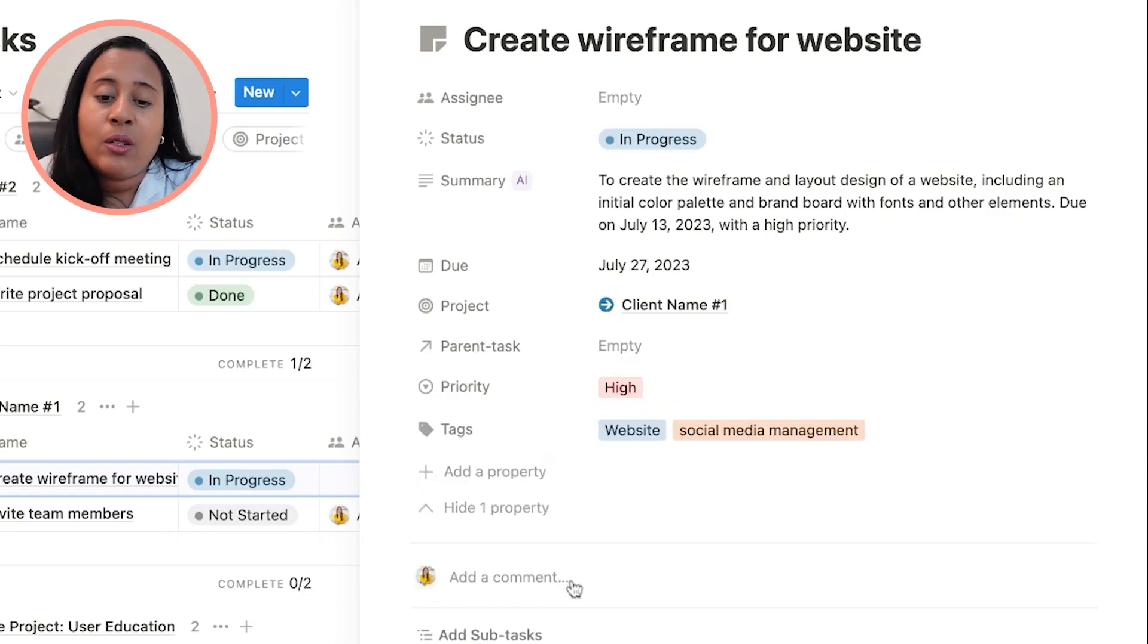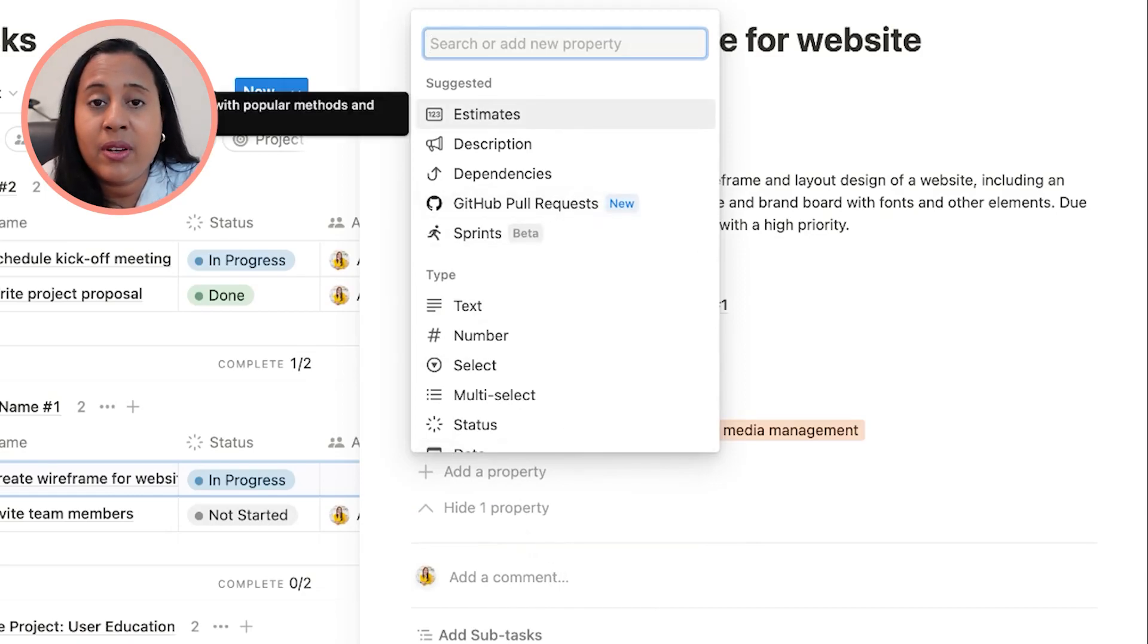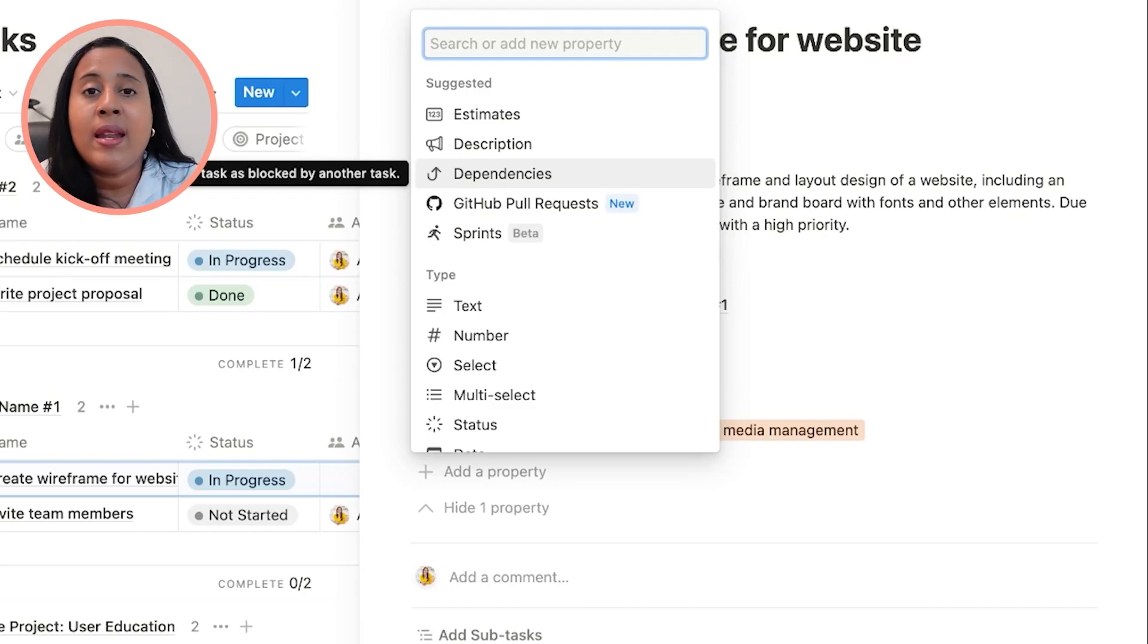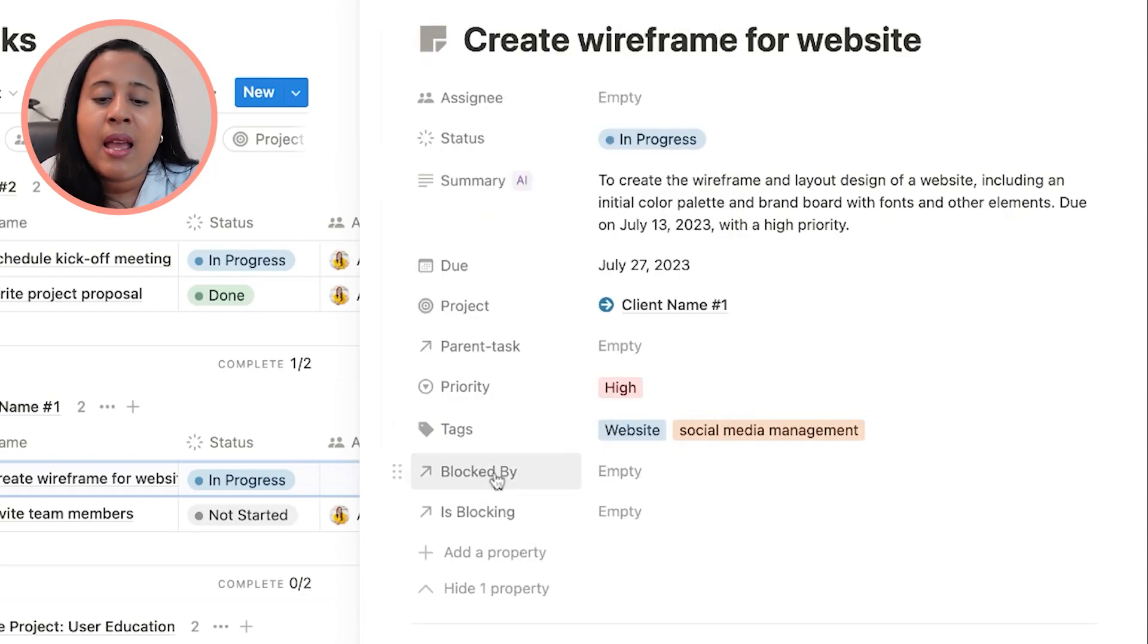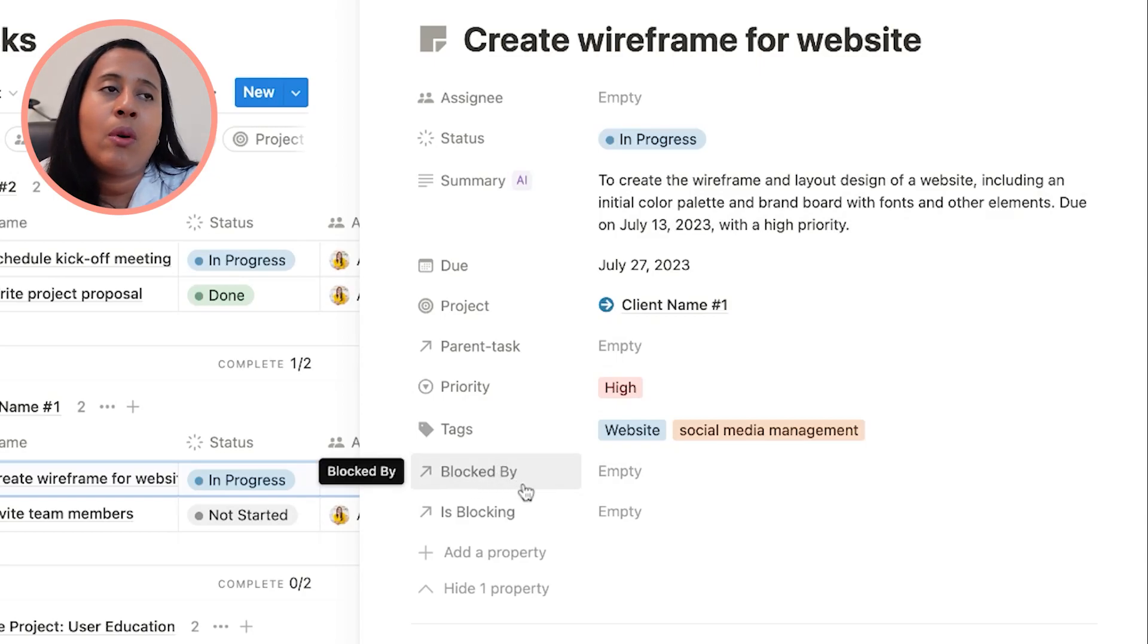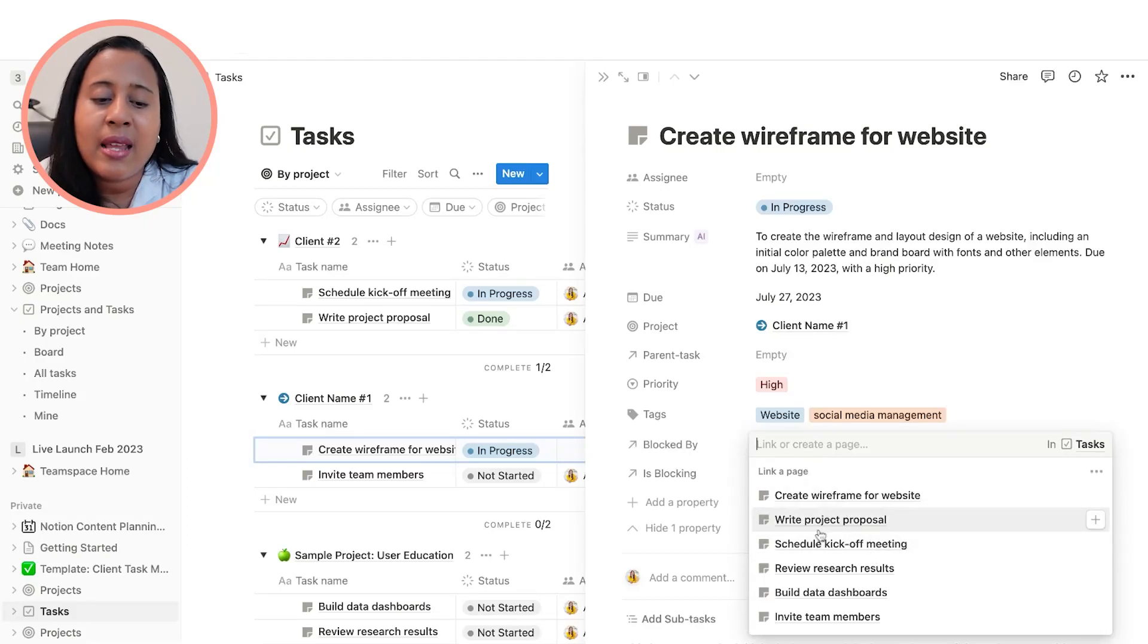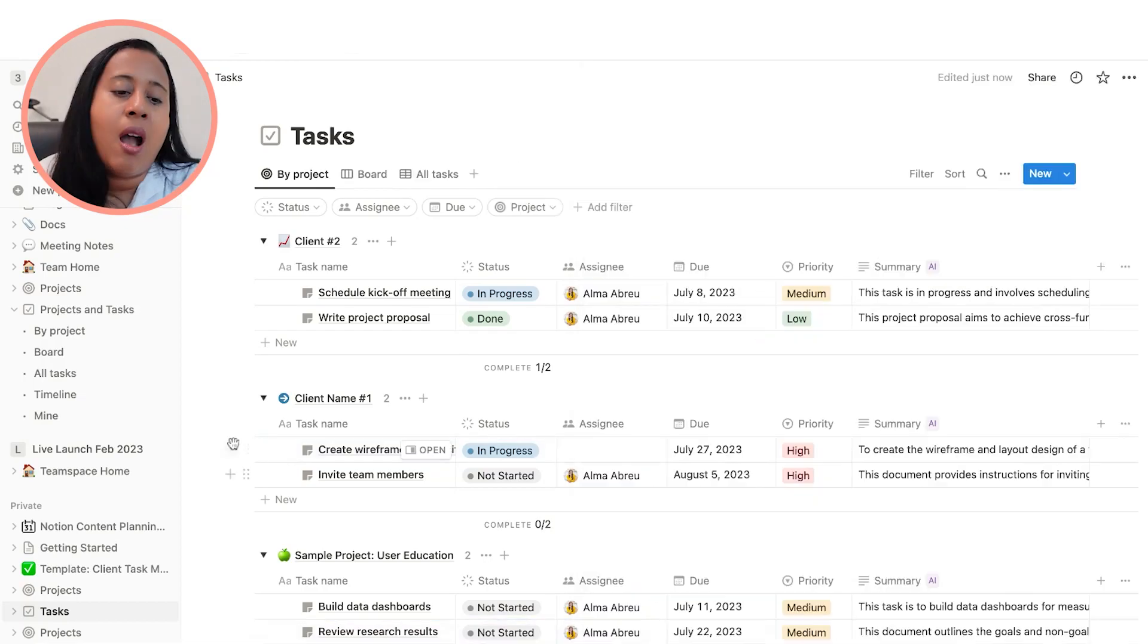The other thing you could do is you can add a property. You can decide to add different things that you want to track for specific projects. If you want to add the dependencies, like other tasks that have to get done before this task can get done, you have to do something else and you're waiting on something, you can actually put a dependency there. I like how it puts this in as far as this task is dependent on another task. What it's going to give you is something called blocked by. This is what we use in project management. That means that there's another task that has to get done before this one can get done. You can go ahead and decide which of the other tasks that you have in this board are blocking this task. I'm just going to choose like a sample one.